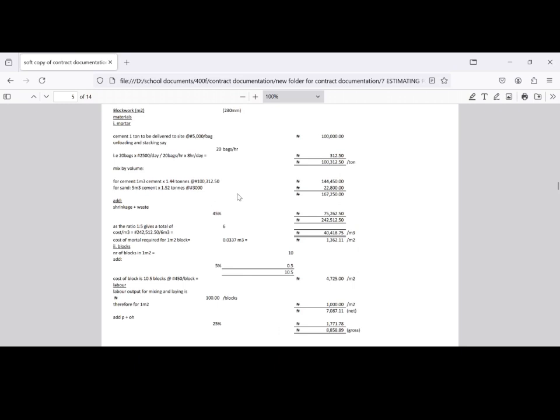Yes, and also for the course of this video, the cost of labor will be 2,500. The cost of artisan, non-trade tested or semi-skilled or unskilled is 4,000, and the labor cost for artisan trade tested is what? 5,000. So what I just finished giving is the what? Labor cost of workers per day, and that is 8 hours, which makes a day.